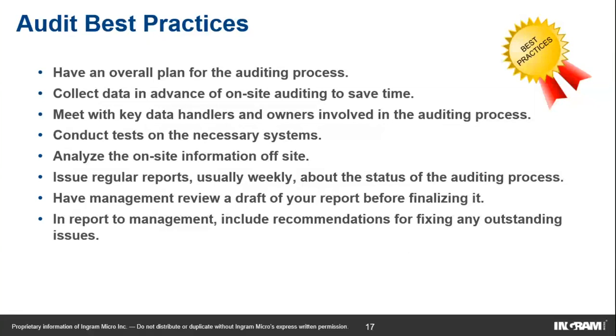And when it comes to assessment, it depends on the type of assessment. You can do regular reports, such as a weekly report, to know about the risk registers within the organization. You can create a weekly report to find out how many risks are pending and how many risks were added as part of the week, or do it on a monthly or quarterly basis. But you need to ensure you have regular reports.